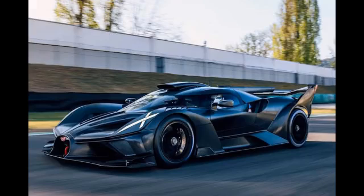Larry Jeffers Race Cars, Procurement in Action. Scenario 1, Engine Procurement. Project: building a new race car for the upcoming season. Target completion date: September 1st. Procurement need: high-performance engine. Research and sourcing. Larry Jeffers Race Cars, LJRC, researches different engine manufacturers, considering factors like horsepower, reliability, cost, and lead time for delivery.